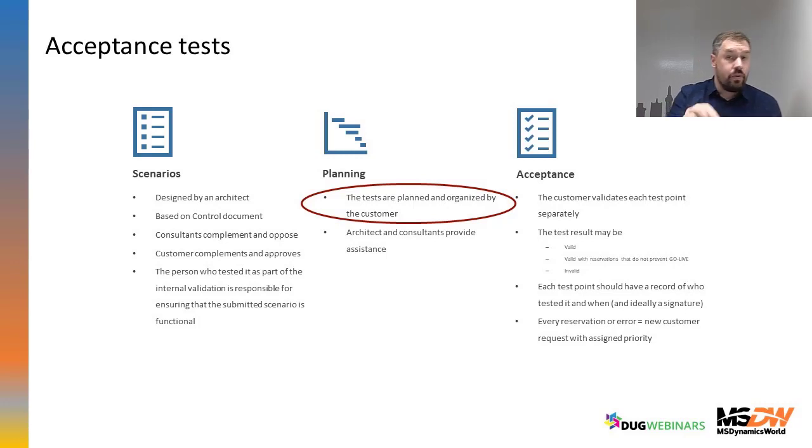And if you are using the process after process planning and the SIPs are big enough to be swallowed, then you can really, during half or 2/3 of the duration of the project, one after another, test all the processes and organize it over time, because of course the customer needs his users to do their own job.